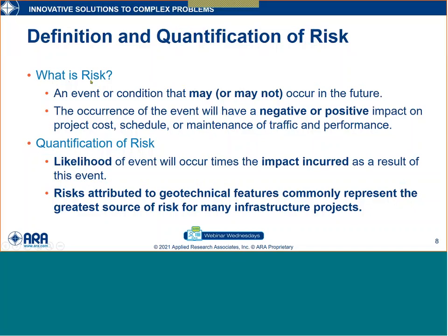What is risk? And two bullets which define that. Most people on the second bullet have a connotation that risk is always a negative impact on some objective that we have. Risk may be negative, that's what we call a threat, or maybe positive, that's what we call an opportunity. The other important item in this definition is that risk assessment is futuristic. So it may or may not occur, and based on our knowledge at a given period of time on a project program or at an organizational level, we're estimating what is the possibility of a threat or an opportunity.